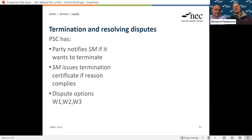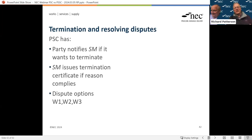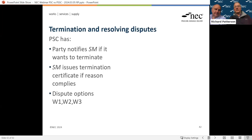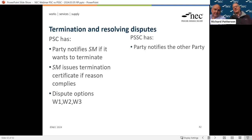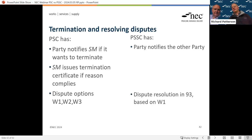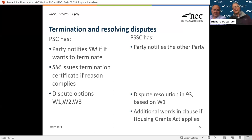On termination: in the PSC, one party notifies the service manager who issues a termination certificate if it complies with one of the detailed stated reasons - and they have to do so 'promptly,' which is a famously odd word for NEC. The PSC also has three different dispute resolution options, exactly the same as in the construction contract. In the short contract, either party notifies the other directly - there's no intermediary service manager. There is a dispute resolution provision rolled up into one clause, 93, which provides for adjudication, with extra words if the Housing Grants Act applies.